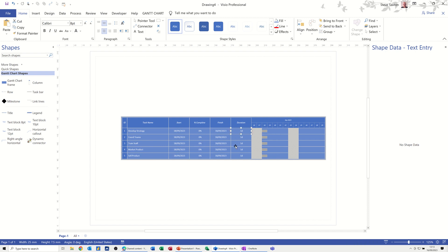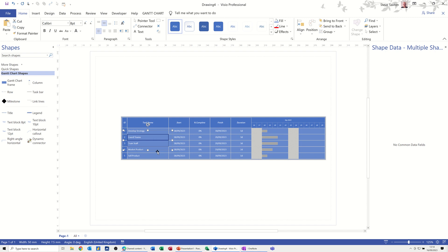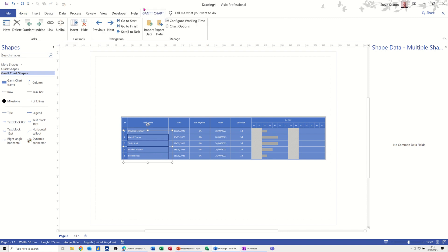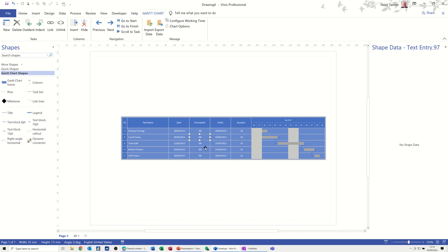You've got finish date, duration — you can change the duration if I change the one below to three days, then two days, three days again, two days, leave one on one day. You can actually link all these together: hold Shift and click on the tasks, then go to the Gantt Chart tab at the top and click 'Link'. It links them so they flow like a proper Gantt chart. If you do a percentage complete — say 34% — you can see a little completion bar appearing there.